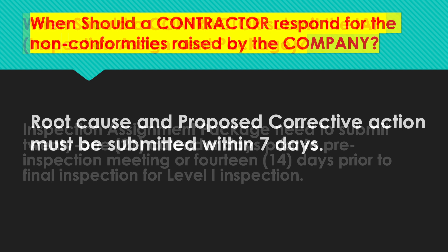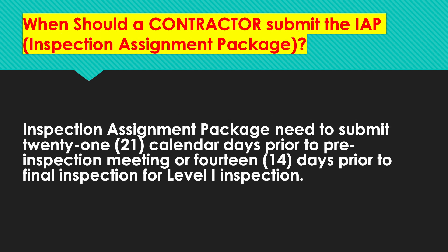When should a contractor submit the IAP — Inspection Assignment Package? The IAP needs to be submitted within 21 calendar days prior to the pre-inspection meeting, or 14 days prior to final inspection for Level 1 inspection category. I will go into inspection levels later.